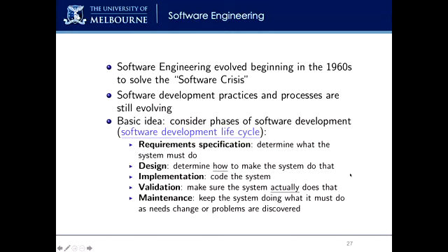These kinds of things happen all the time, whereby things change mid-flow that causes problems. Now, a common thing that you'll see is people saying that they want you to have what's called a software life cycle or a waterfall life cycle. And this is pretty old-fashioned, and I would say it's not a great way to produce software unless the software is almost boilerplate, very simple and obvious to produce. So you get the requirements first, then you design, and then you start implementing the code, you then validate the code, and then you provide maintenance.